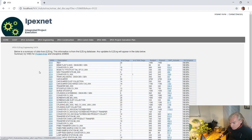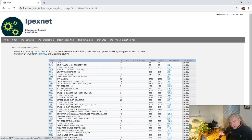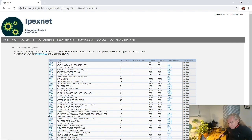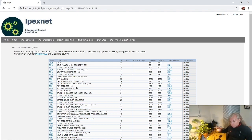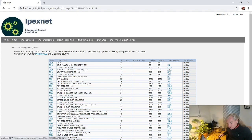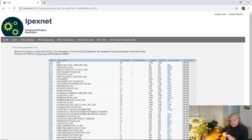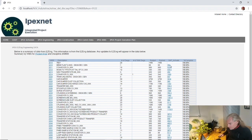What we're looking at right now is for the mechanical engineering discipline on this project. We have a bunch of areas, WBS elements, and then for each one of those we're actually pulling in information from our SAP timesheets because the SAP timesheets are coded to this WBS level. That's obviously a good bit of integration that we've got there.